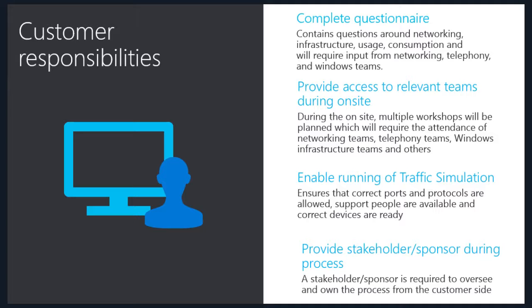The other thing they must do is make sure that they actually help you with the traffic simulation. It's a required part of any network readiness assessment, and it's something the customer must do with you. You will need them to provide either some materials or some PCs or access to the network, and that's a customer responsibility as well.